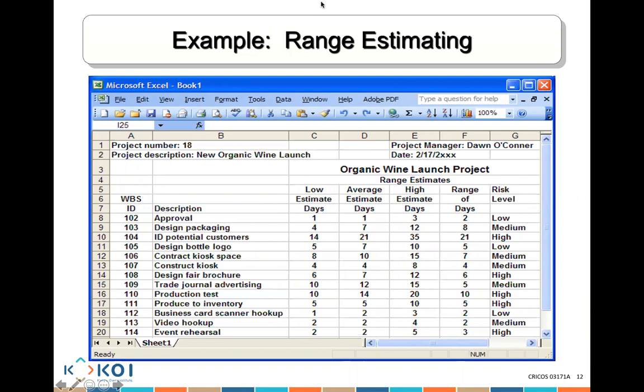Yes, in many IT projects, they do actually prefer the bottom-up approach. The reason they prefer it is because they can get much more specific information about how much a specific project is going to cost and how long it takes. It's something they prefer, especially when they are working on the tasks in detail.